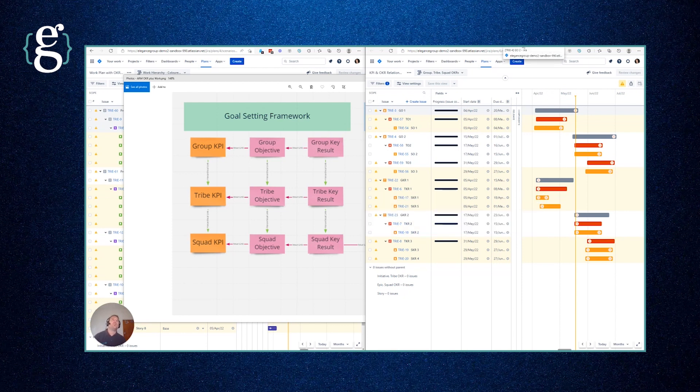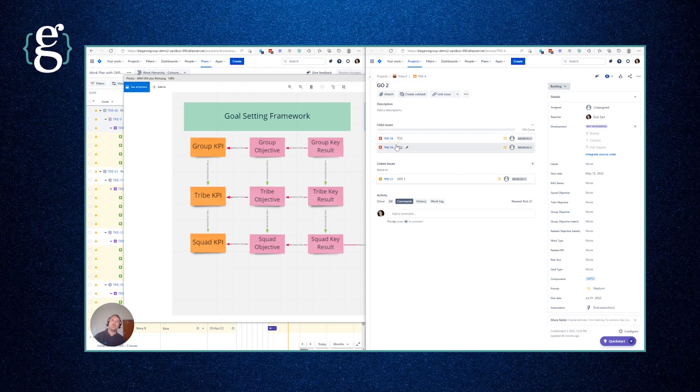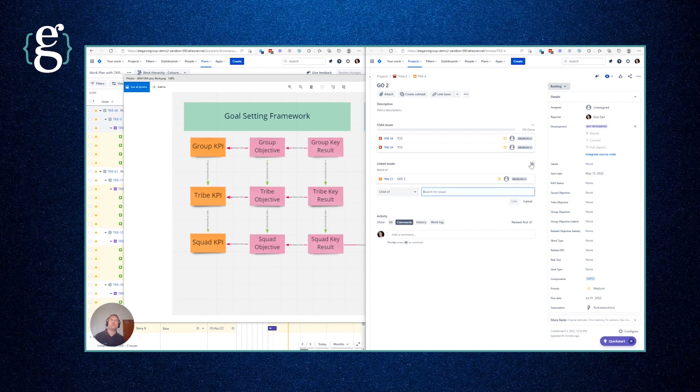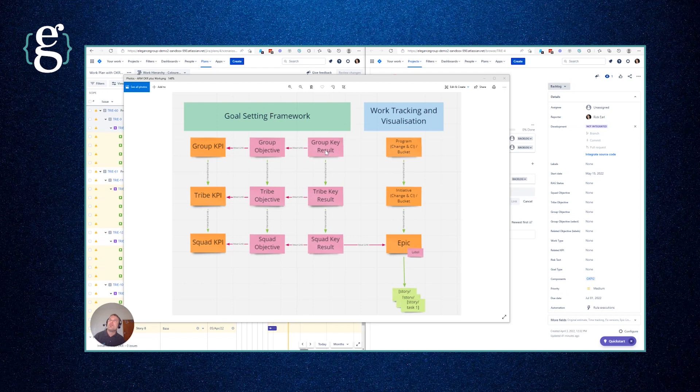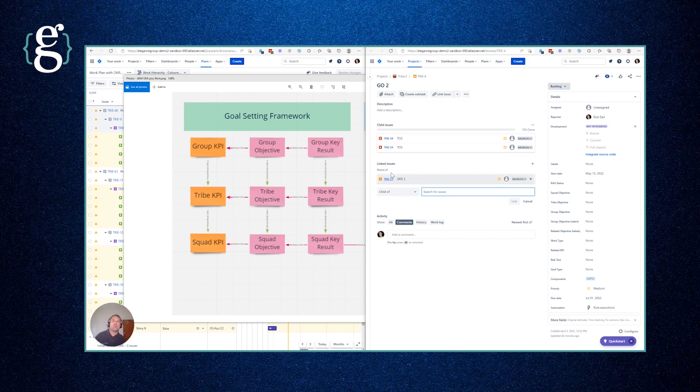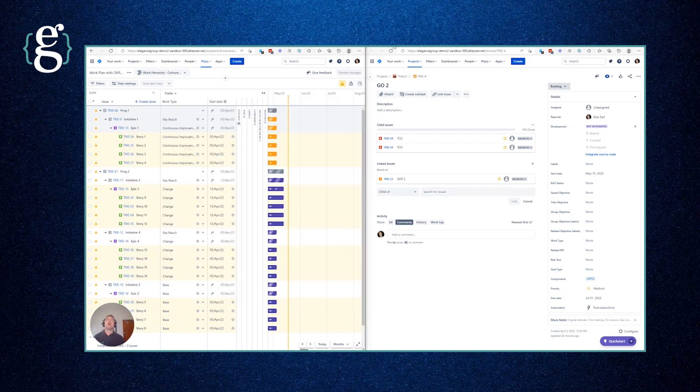You can at any time just go into the issue itself and we can see the group objective two has these tribe objectives as direct children delivering on it. But also group key result is a linked issue parent, and so we can add all of the key results that deliver on this objective. We can add all of the key result relationships to the group objectives that they deliver upon through this flat relationship directly in Jira if we want inside the tickets. We're just using the linked issues. You can see here we have group objective two that is being delivered upon by group key result two and this relationship in the linked issues represents this.